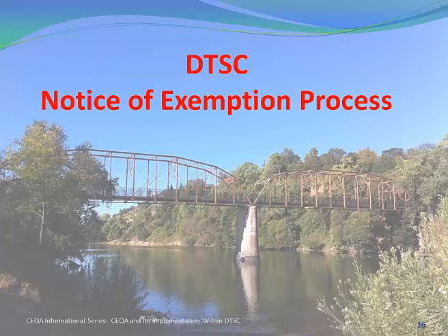Marilee has a comment. I could add a little bit to that, too. We may think that a facility is the exact same facility, but we need to do an analysis of that. We're going to need to look at what did the previous permit authorize, and what is the new permit renewal asking for? And we need to document how we come to our conclusions. It's not enough to just say, oh, it's the same facility, we're going to do an NOE.